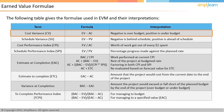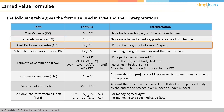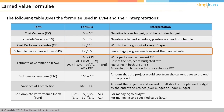In schedule variance, a negative value means the project is behind schedule, whereas a positive value means the project is ahead of schedule. The cost performance index (CPI) and schedule performance index (SPI) values vary between 0 and 1. For example, a CPI of 0.8 implies that 80 cents of work is obtained for every dollar spent. Similarly, an SPI of 0.9 implies that the project is progressing at only 90 percent of the speed originally planned.